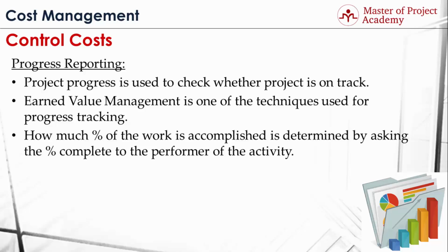These kinds of progress checks are generally done by asking the performer of the activity for the percent complete. This method may be easier to manage in smaller project teams. You can check with each project team member about the status of his tasks. However, let's assume that there are hundreds of project team members in a project. It'd be insane to check the percent completion of each task with the project team members, and it would be unhealthy though.